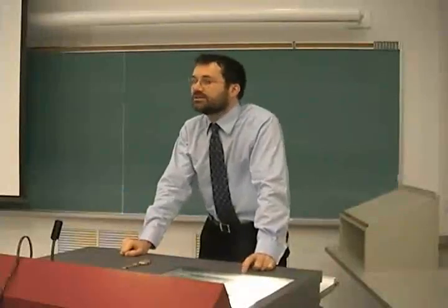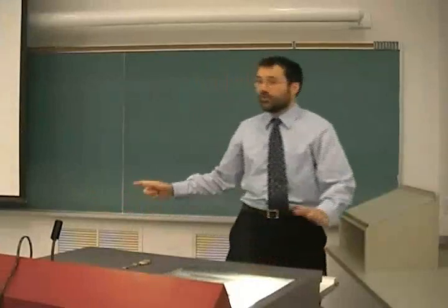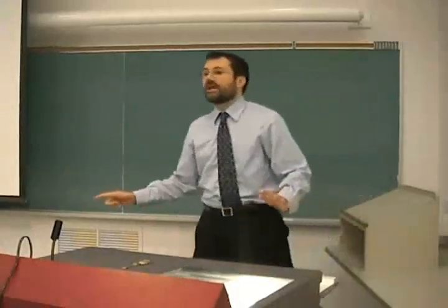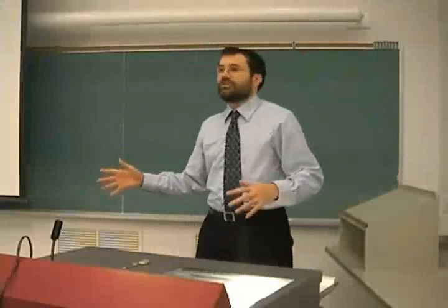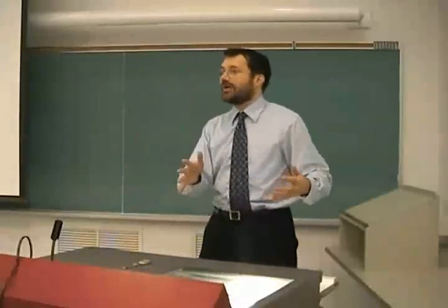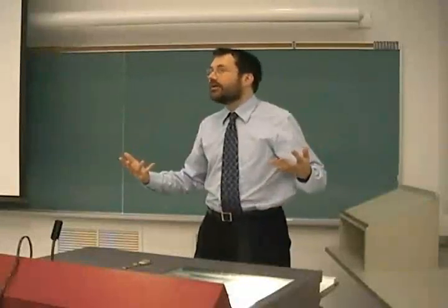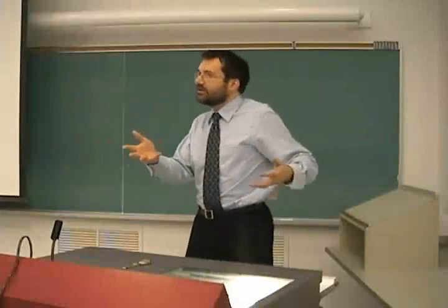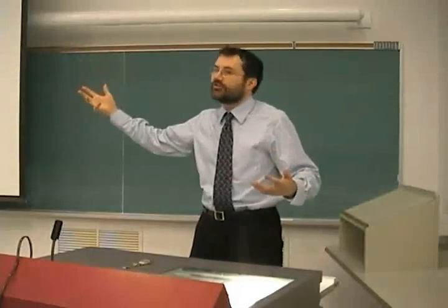So if this person who we pay $80,000 is going to spend a year to develop on their own, which is somewhat unusual, this piece of software, then we say, well, the cost of developing that software is going to be $150,000, $160,000, even though we're paying them only $80,000. Now, if we hired 2 people, both at $80,000, then we would say, okay, well, now the system is going to cost us $300,000.